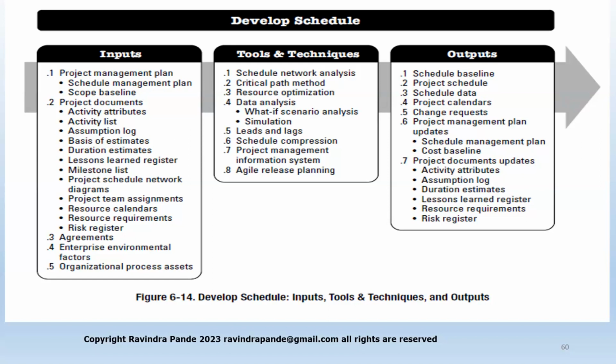Similarly, on some project, let's say we are doing an attendance management system enhancement. Now there's a team with Ravindra going to the St. Louis office. There's a team going with Sarita at the Chicago office, and they complete this in parallel. And this is what we call schedule compression. So whenever you work in parallel with a number of resources, the overall schedule of the project gets compressed. We can complete the project within fewer days, fewer sprints. Are you with me, ma'am? Got it, sir. Thank you.